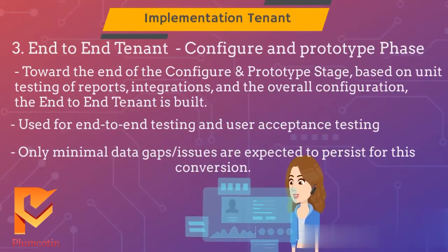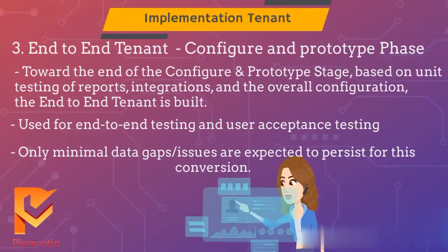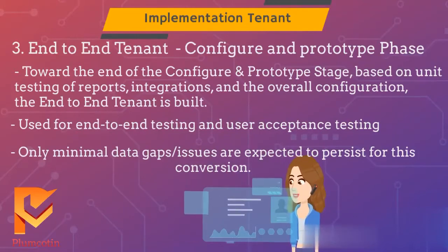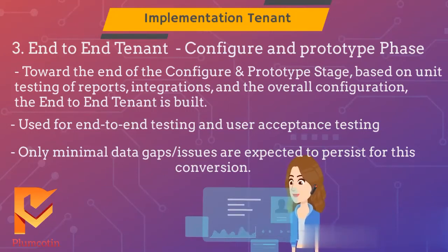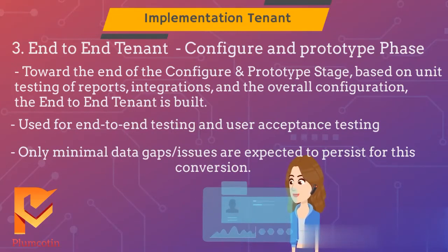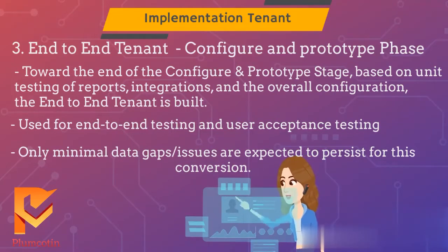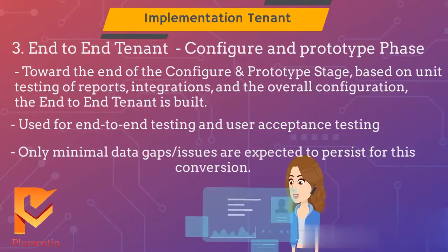End-to-end Tenant. Toward the end of the Configure and Prototype stage, based on unit testing of reports, integrations, and the overall configuration, the end-to-end tenant is built. This tenant is used for end-to-end testing and user acceptance testing. Only minimal data gaps or issues are expected to persist for this conversion.